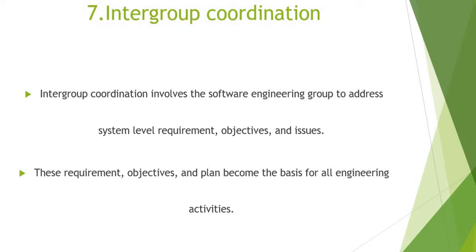Work products produced as input to other engineering groups are reviewed by representatives of the receiving group to ensure that the work products meet their needs.